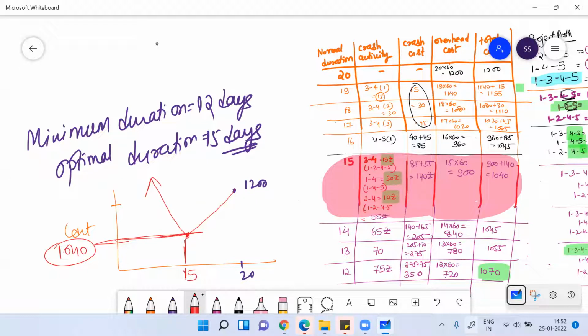The extra input being employed should be reasonable enough to bring the changes. So we can bring much better manpower or much better machines for a limited time period, so that we can reduce the project duration. But every time we do this, we end up paying more money. So automatically the cost will increase.